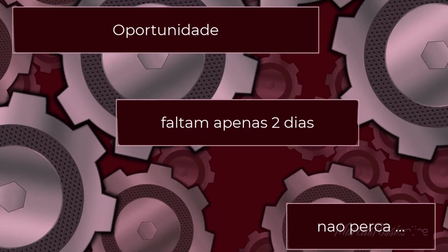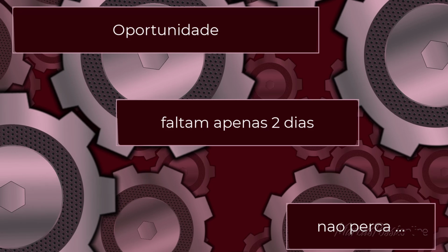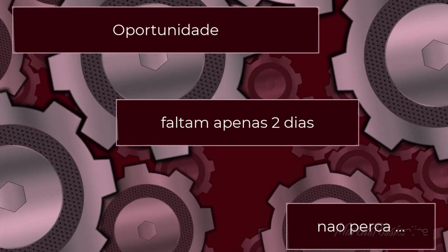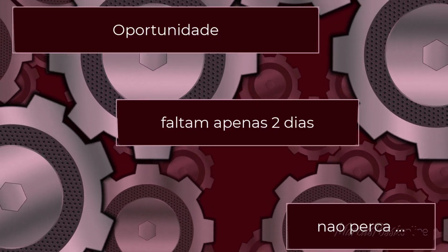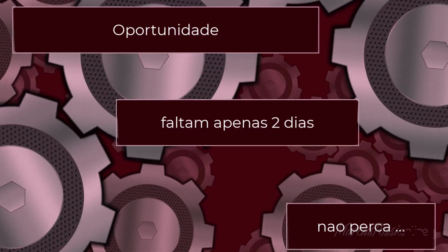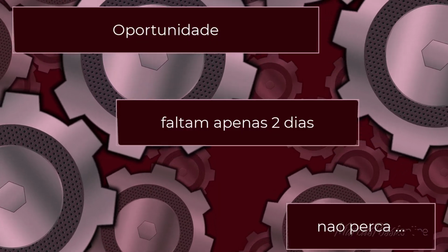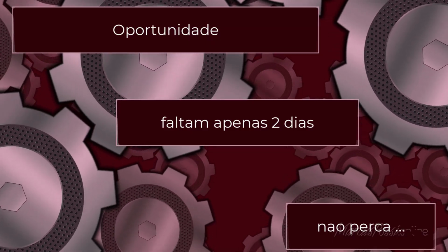These let you lock in specific dates, maybe client milestones or regulatory requirements that the schedule must respect, regardless of the pure logic. Okay, like hard stops. Right. And the fourth constraint mentioned is space, the physical availability of the work area. Super important in construction, often missed in purely logical schedules. So applying all these resource constraints ensures the schedule reflects actual practical capacity.